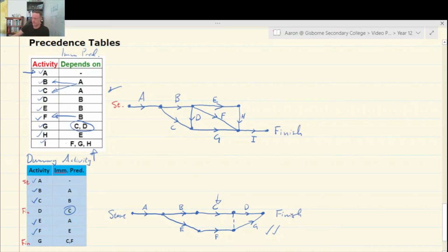There are different, they can look different, and the practice is key here. But I'll leave that example there. So we've done all of that. We've finished there, finished there. So that's how to construct from a precedence table. Like I said, I like having a look at what's at the start, what edges or activities come in at the finish, and identifying what joins as we go through, completing sort of one node at a time. Also reading forward a little bit just to know if they come together in a specific place.